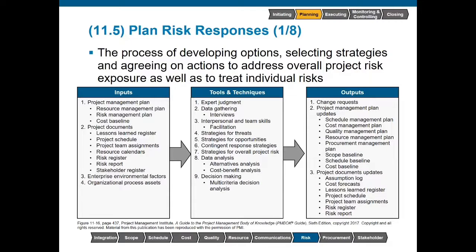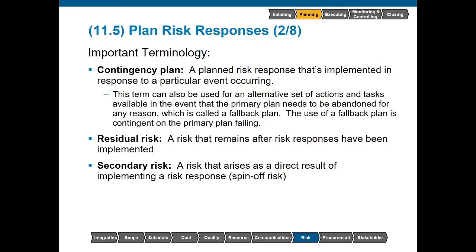Plan risk responses is the process of developing options, selecting strategies, and agreeing on actions to address overall project risk exposure, as well as to treat individual risks. Some important terminology within this process. A contingency plan is a planned risk response that is implemented in response to a particular risk event occurring.